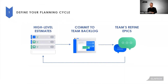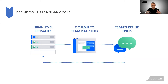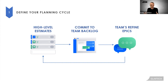First up, define your planning cycle. Now when starting out with the tool, you're often thinking bottom up. You've got your stories and your tasks and your bugs and you're now thinking about how to roll those up into epics and into initiatives in that large view. But think about the real process. The work started actually as an initiative and it was broken down into smaller chunks. And planning is the journey of mapping that from the large ill-defined initiative down to the delivery of the stories and the tasks that fulfill it.